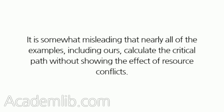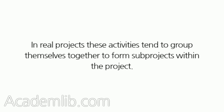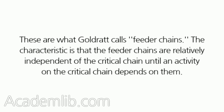It is somewhat misleading that nearly all of the examples, including ours, calculate the critical path without showing the effect of resource conflicts. All the activities in the project that are not on the critical chain are, by definition, non-critical activities and have some float associated with them. In real projects these activities tend to group themselves together to form sub-projects within the project. These are what Goldratt calls feeder chains.